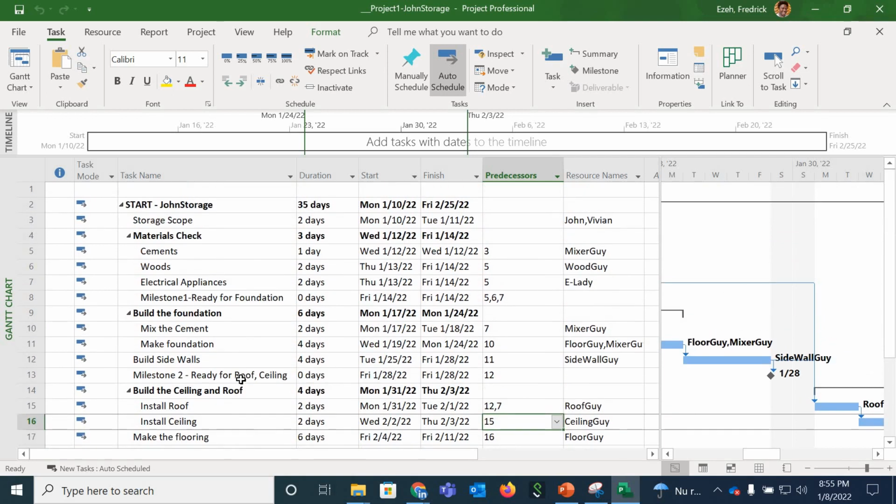When we talk about critical parts in a project, it means by the time you make a plan, you need to check for risk. And one of the risks is looking for your critical path. And what does critical path mean? It simply means a set of activities in your plan that really determines the end date of your plan or your project, which means if something goes wrong with those activities, chances are that you will not finish when you plan.